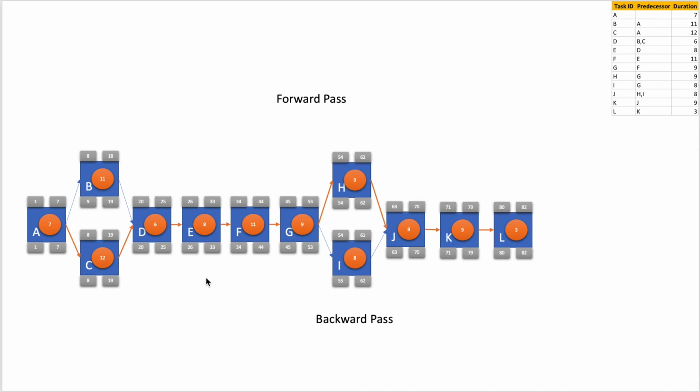So if I calculate late start minus early start for all these activities which I have painted on the orange arrow, it is 0. So when an activity has 0 slack, we call that activity is on the critical path. So this orange color path that we have traversed from the start of the project till the end of the project is known as the critical path.